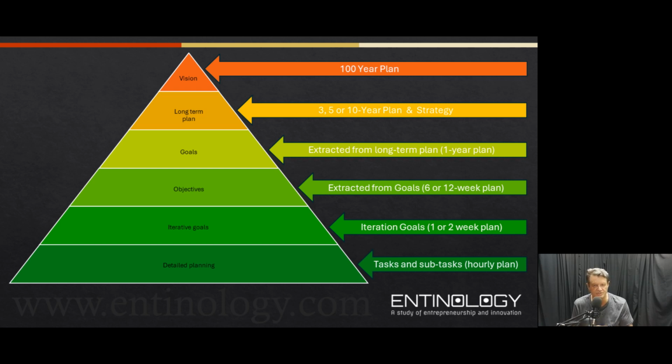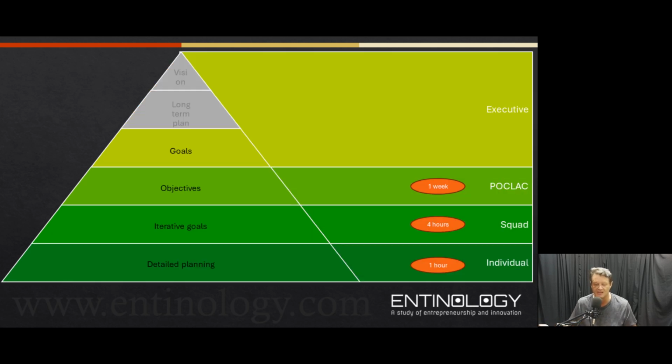You can still use your planning poker, you can use t-shirt sizes to estimate and all that stuff. But when it comes to the planning of the work you're going to execute for that sprint, you want to use hours, because that gives you an idea of how long it will take you to do stuff.